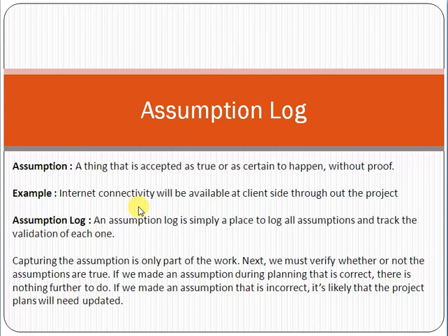So it is very necessary to put all the assumptions in a log, in a document, and you need to verify and follow up on these assumptions after some time. It is necessary, because if the assumptions become incorrect or false, it will definitely impact your project. So this is the purpose for making the assumption log: to verify whether the assumption is still true or has become incorrect.